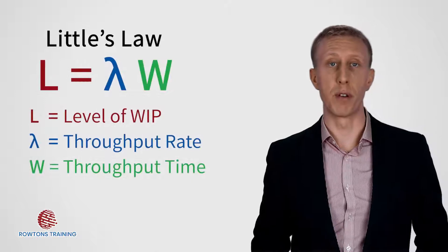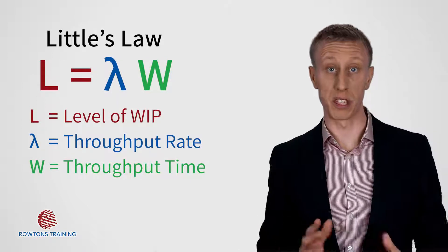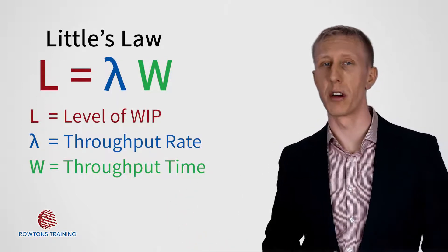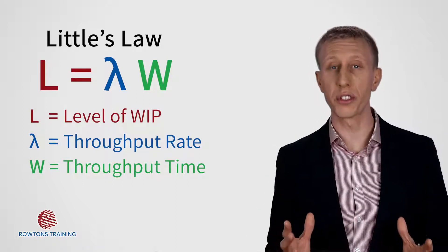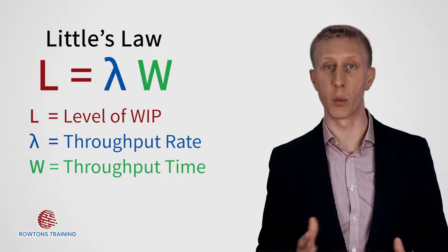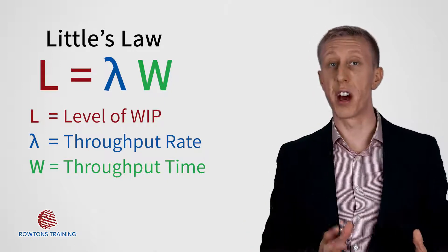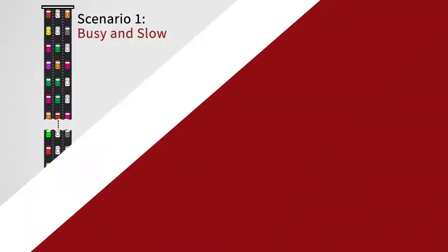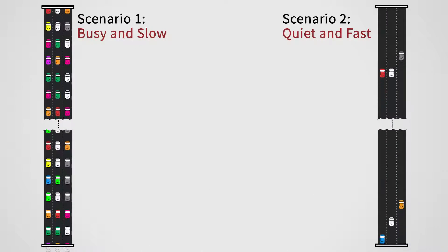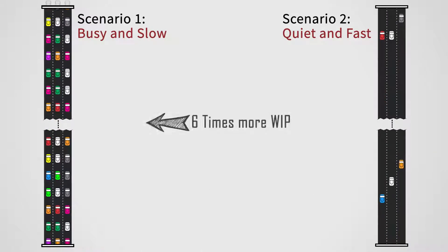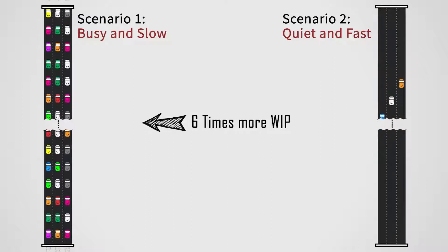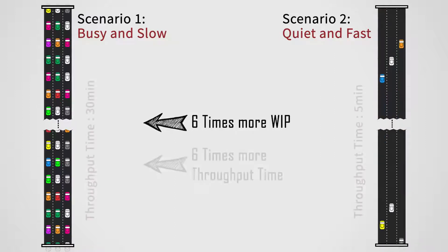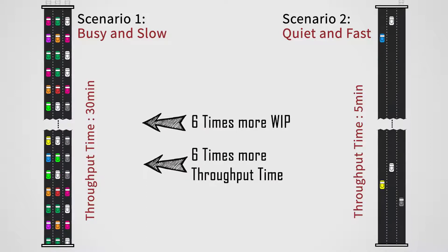If we keep the throughput rates the same, as was the case in our two toll road scenarios, we can see a direct relationship between the quantity of work in progress, the WIP, and the throughput time, or the lead time. On our toll road, when they were going slow, there were six times more cars on the toll road, WIP, six times more WIP, and the throughput time was six times longer.